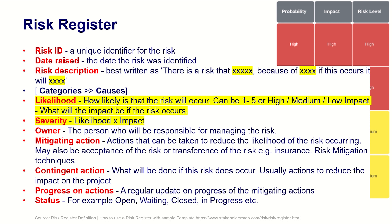You need to identify each risk with a number and describe it in a separate column with more details, so it will be clear what the risk is about. We have one specific column for the risk ID, one for the risk description, and you may want to add a column for the date raised — when the risk was identified. The next column can be category of the risk or causes.